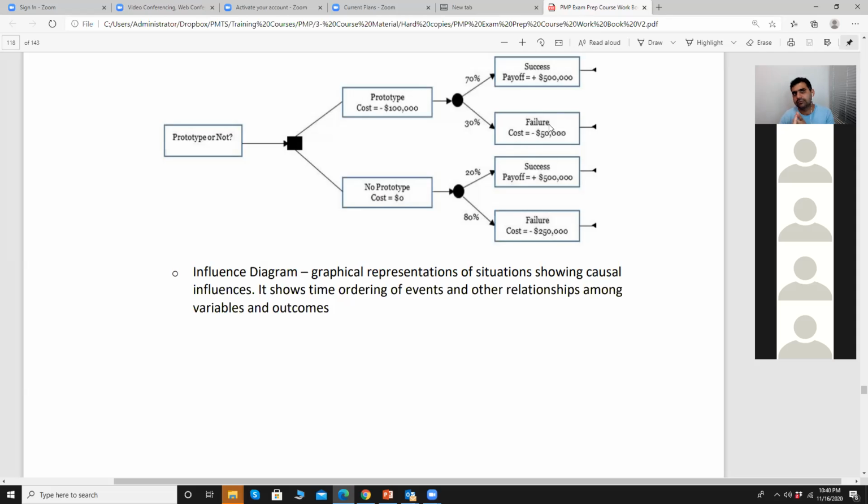That would be 15,000. So 15,000 for risk 1, 2,000 for risk 2, and so on and so forth. And at the end, if you aggregate the whole number and, for example, total it to 200,000, this 200,000 is your contingency reserve in terms of money.